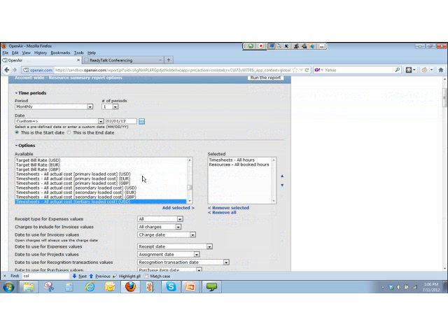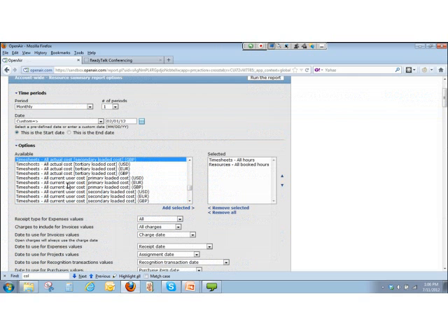So you come to timesheets and you keep seeing things like actual cost and current cost. What's the difference between actual cost and current cost? What that means is timesheet actual cost is coming from that override value. It's going to come from the task, and if there's nothing on the task, it'll come from the project. And if there's nothing on the project, then it's going to go back and look at the user. So if you don't have any overrides, actual and current are exactly the same thing. But if you have an override, actual is the override value. Current is always coming from the user record.